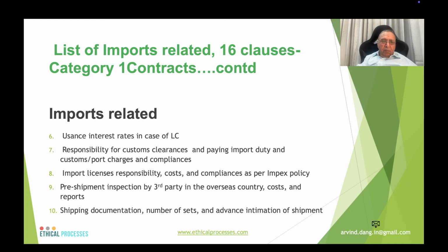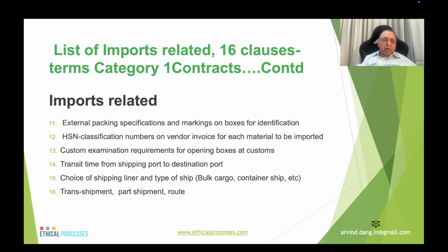Shipping documentation, the number of sets and the advance intimation of the shipment to be sent by and by how many days, external packaging specification and markings on boxes for identification at the port, whether shipping port or the airport, HSN classification numbers on the vendor invoice for each material to be imported because custom duty is based on that, custom examination requirements for opening boxes at the customs,